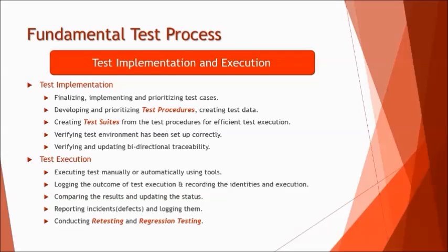Verifying the test environment has been set up correctly. So yes, in test design, we were trying to create the environment. Now we make sure that the environment has been deployed or set up correctly or not, so that we can begin with the execution. Also, the traceability matrix that you had created in the previous stage, test design, here we will be evaluating it. That is filling in the information and making sure that we have covered all the requirements in the test cases or not, which is just a precautionary step to check whether we have missed anything to be converted into a test case.